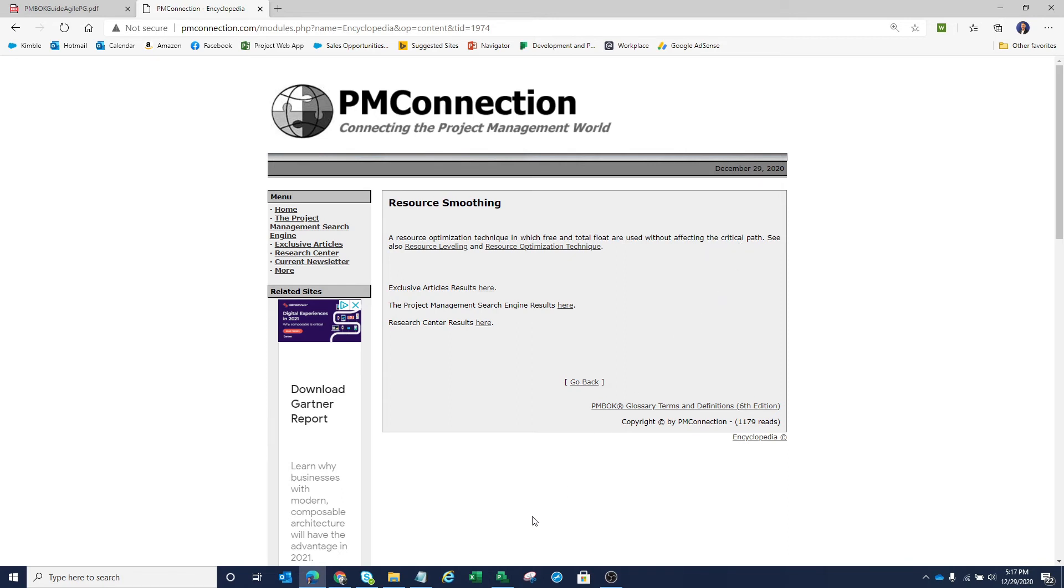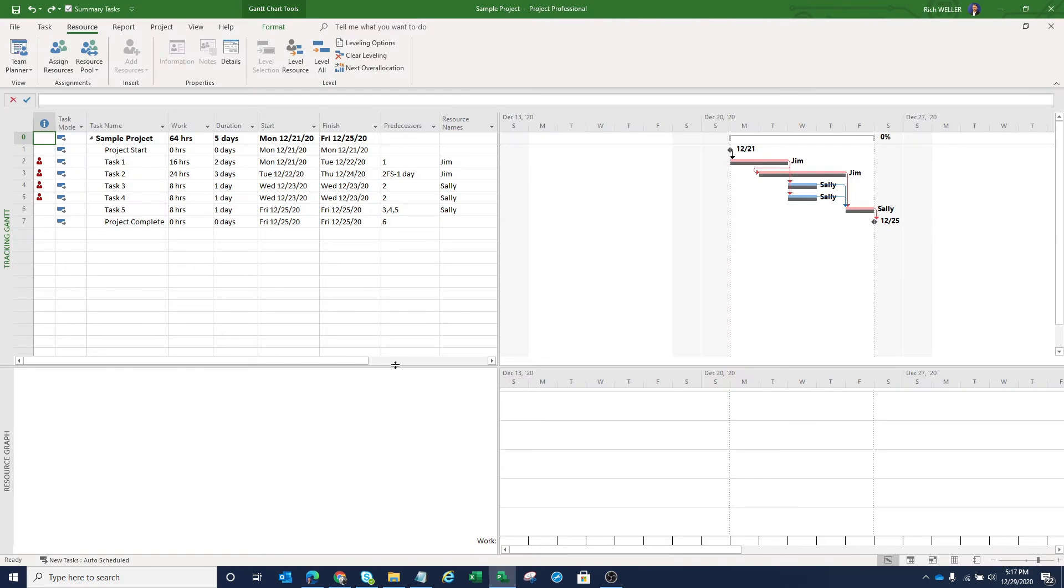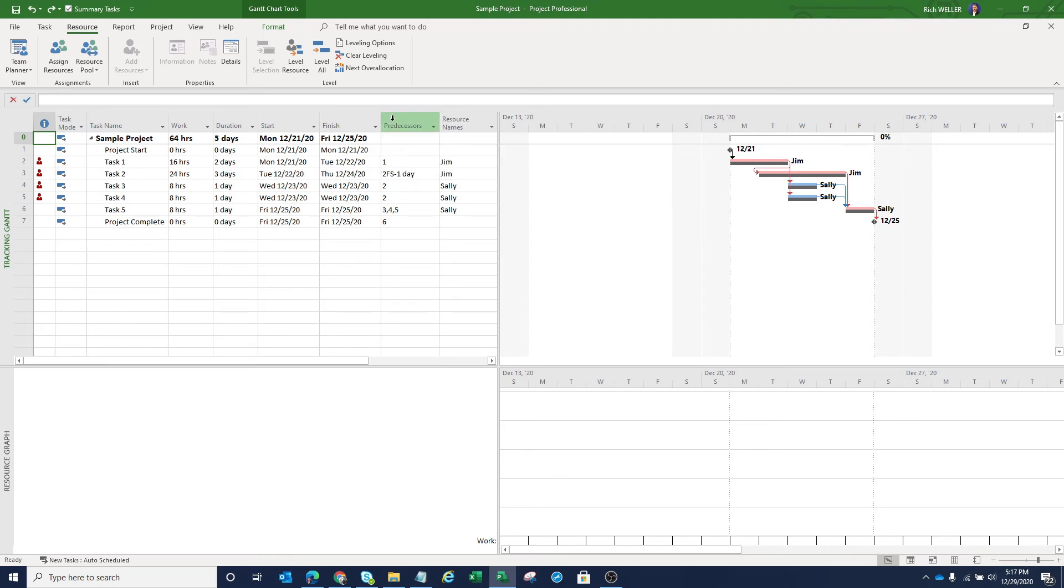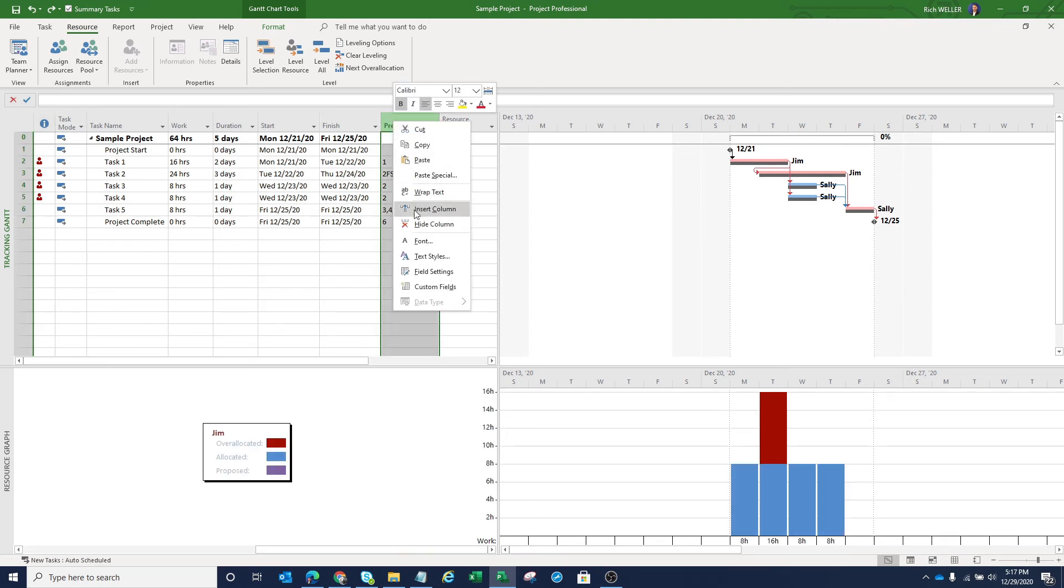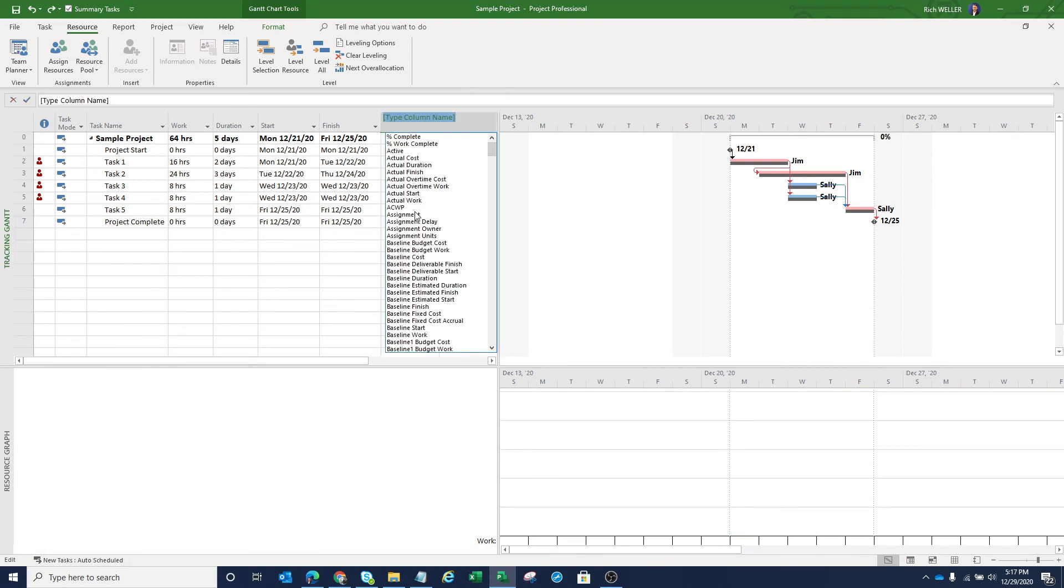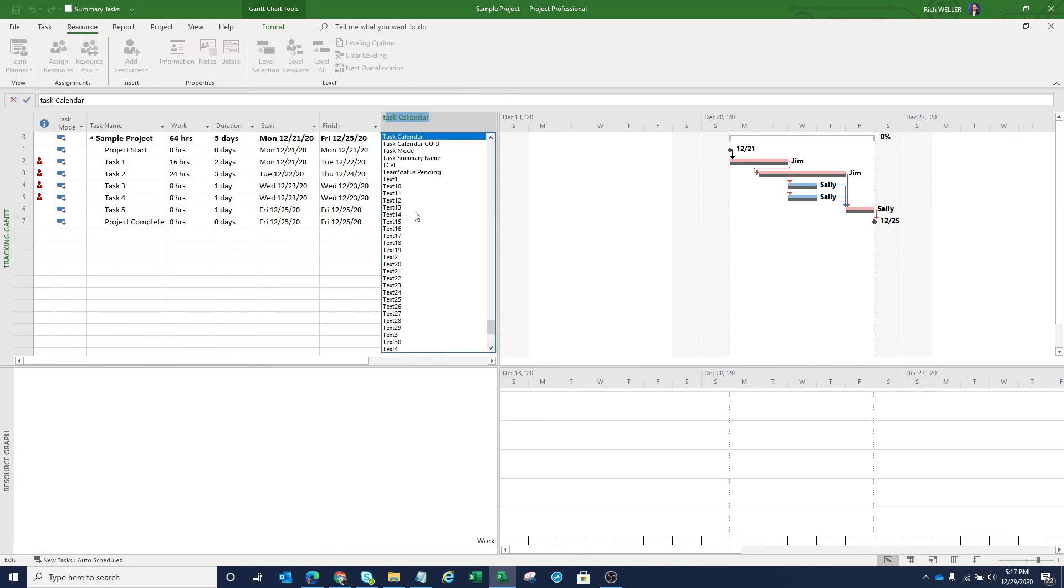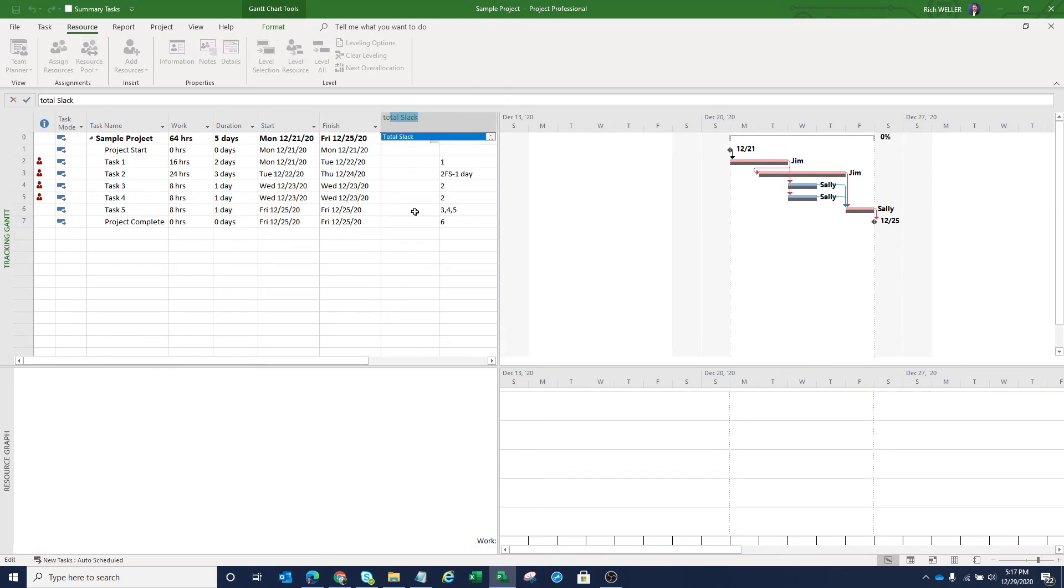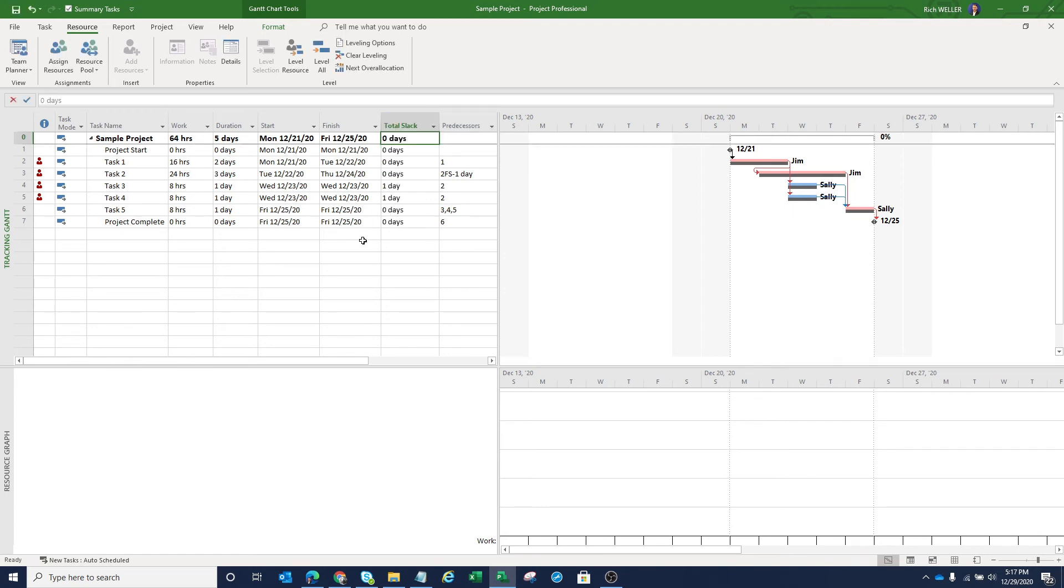Resource smoothing is a resource optimization technique in which free and total flow are used without affecting the critical path. So now let's jump back over to our Microsoft project schedule here, the one that is currently over allocated. And let's add an additional column into this tracking Gantt view. I'm going to right click here on the predecessor. I'm going to insert the column and within Microsoft project, the column I'm going to insert is called total slack.